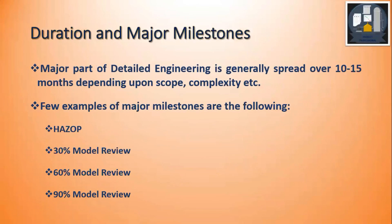Next we come to duration and major milestones. The major part of detailed engineering is generally spread between 10 to 15 months, though this is not absolute — it may vary depending on the scope and complexity of the project. Within the detailed engineering schedule, there are many milestones; examples include percentage completion milestones such as 30%, 60%, 90%, etc.